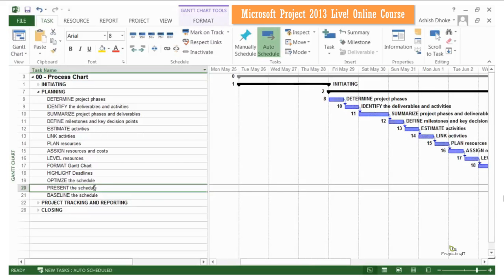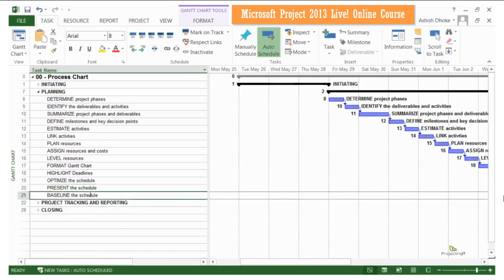Once the stakeholders have given the go-ahead, we will baseline the schedule. By baselining the schedule, we mean that we freeze the scope, time and cost targets that we have agreed with the team and stakeholders. Once the targets are baselined, we should not make ad-hoc changes to them and only formal change control will be used to make changes to the schedule. We are also going to look at how we manage the baseline — how we can preserve the previous ones and create new baselines.